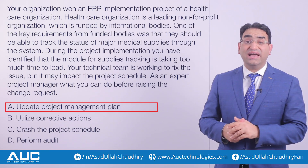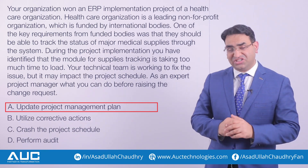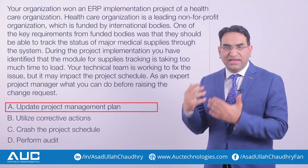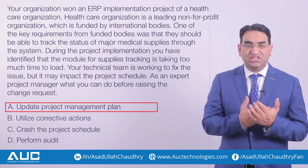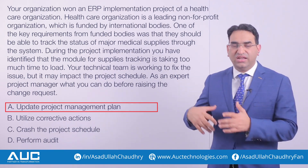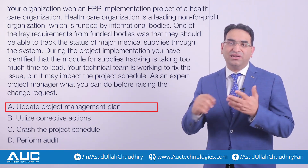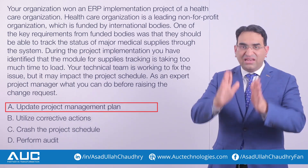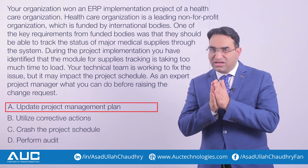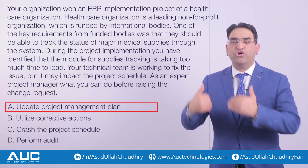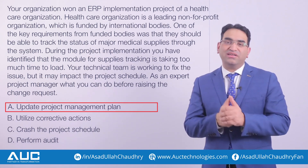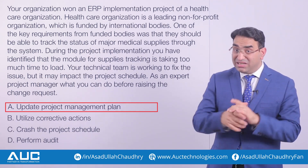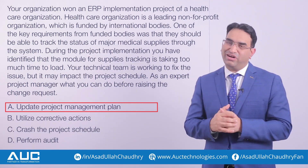Option B says utilize corrective action. When you say you are going to utilize corrective action, it means you have raised a change request and asked to implement corrective or preventive action. The question clearly states what you can do before raising the change request. So option B is also not correct.